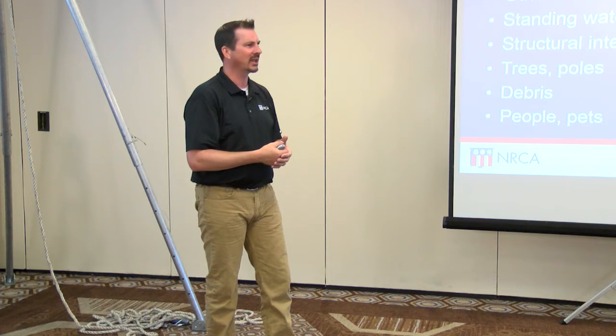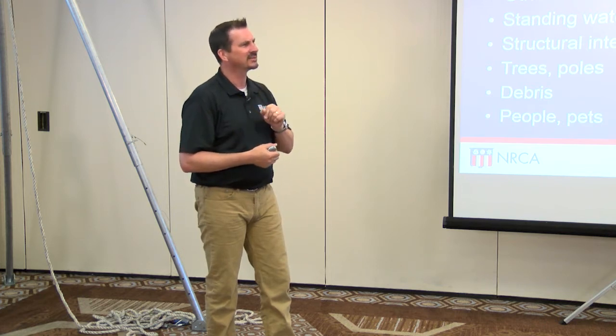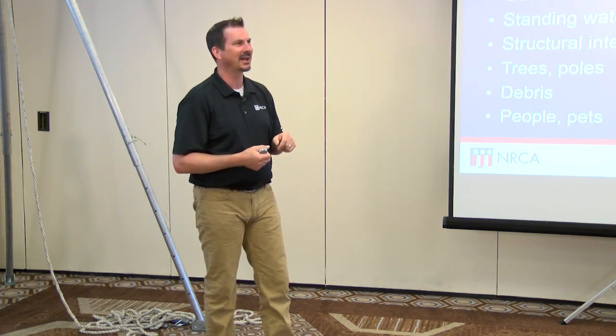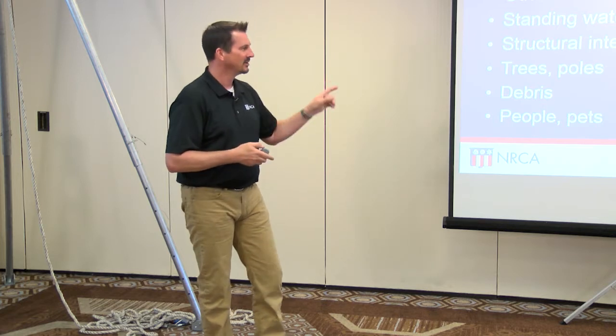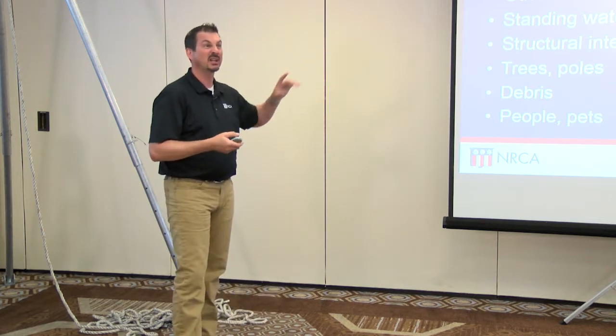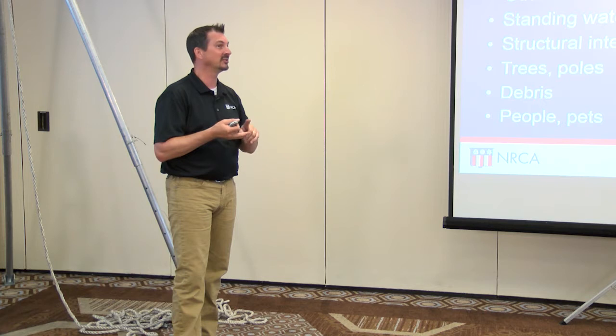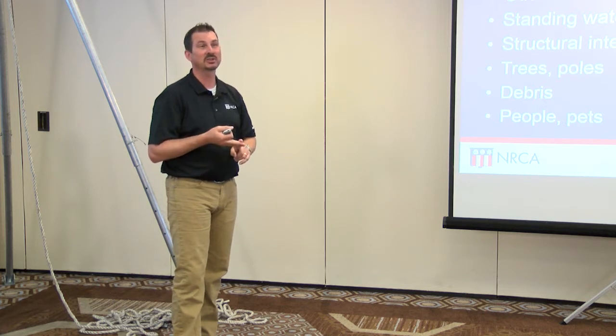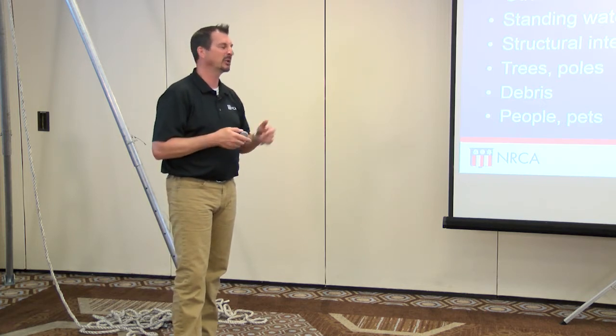And in the end, the owner came back and said, wait a second, I don't think that was damaged before you guys got here. Why don't you pay for it? So we have to be careful with this, and that's why I always said filming, videotaping, and taking pictures as much as possible prior to the job start is going to be critical for us.